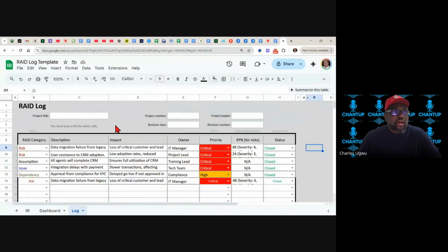I do not have the capacity to send. My own is just to instruct, and I must follow the link. And Chidera did not send the link. Now, I'm depending on Chidera's activity before I can do my own work. Any mistake on Chidera's side automatically will have a knock-on effect, which is going to affect me. That is becoming a risk, and it can equally trigger an issue. So that's why we capture activities surrounding this area, because all of them are capable of causing harm to your project.